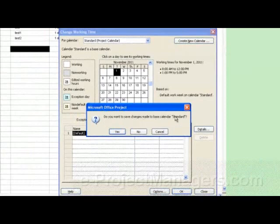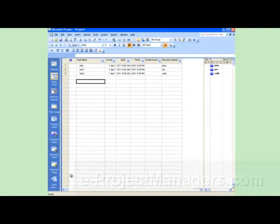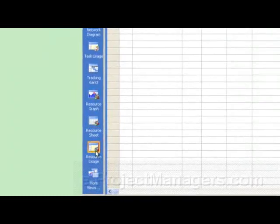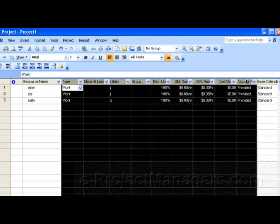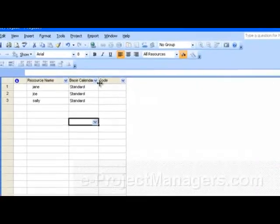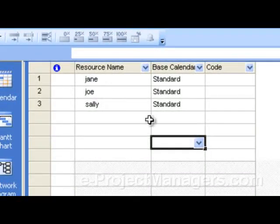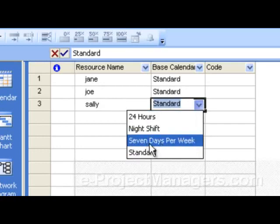When prompted to save changes made to the base calendar, click Yes, then click OK. When you go to the Resource Sheet, one of the column options that appears is the Base Calendar column. So if you have a resource that's working seven days a week, you can then assign that resource to the Seven Days Per Week calendar.